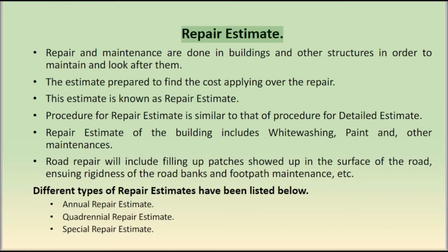Repair estimate. Repair and maintenance are done in buildings and other structures in order to maintain and look after them. The estimate prepared to find the cost of the repair is known as a repair estimate. The procedure for a repair estimate is similar to that of a detailed estimate.